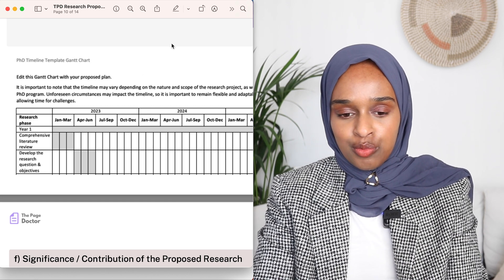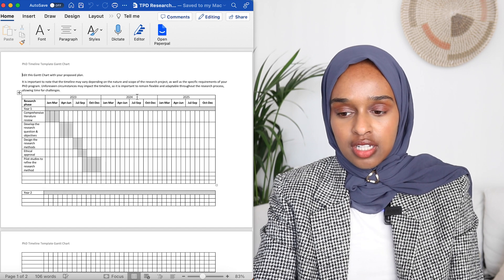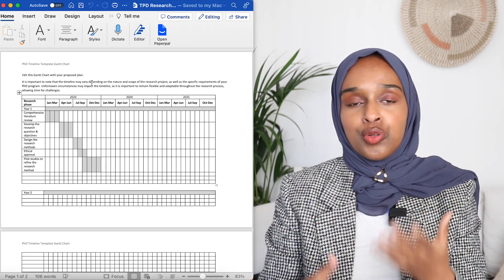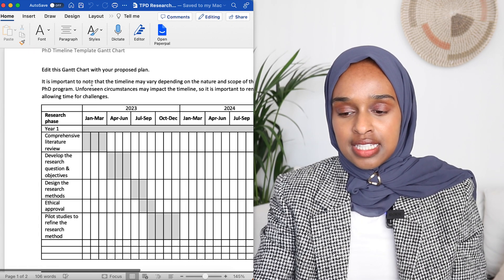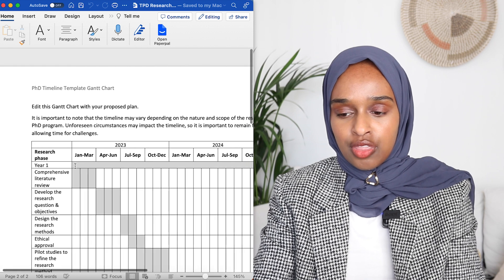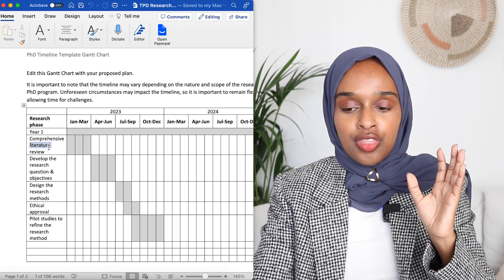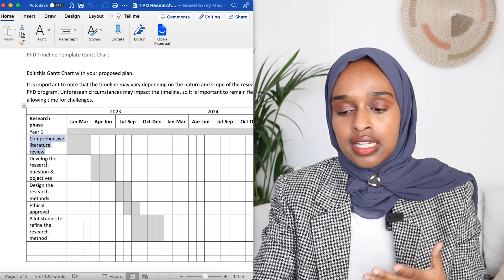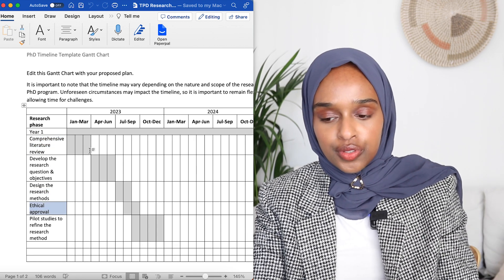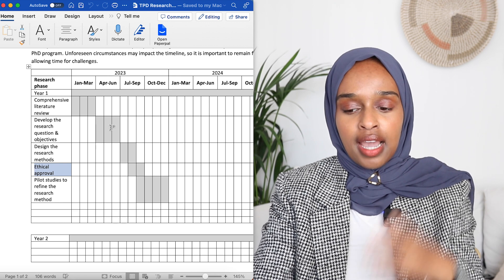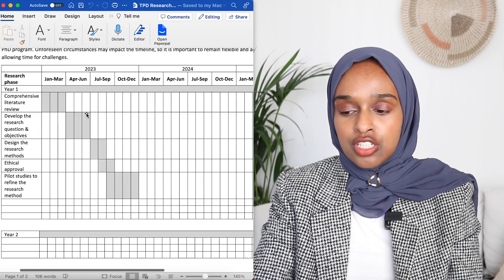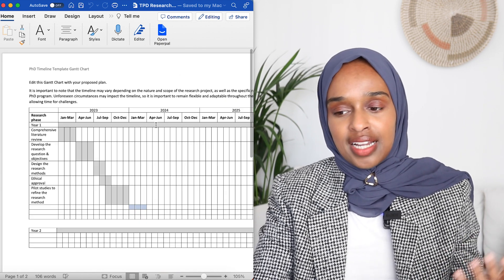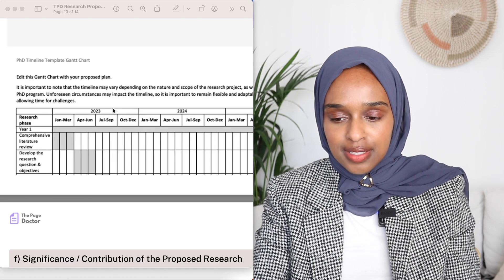The timeline is essentially a Gantt chart, which allows you to show how you have progressed and how you are planning to progress through your PhD. I've done three years here — year one, year two, and year three. You add the particular task on the left — for example, writing a literature review, research questions, methods, ethical approval — and then you highlight how long each task will take you. That is what a Gantt chart is, and it is included within this template.